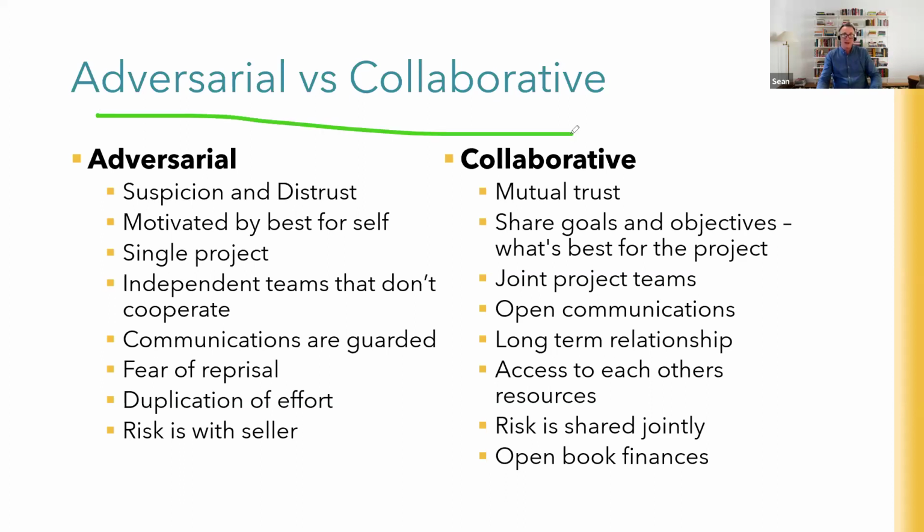So there are definitely advantages to going collaborative. But as I said, it's not just a simple shift, because organizational culture is the biggest challenge here. I've been on one alliance contract where they actually spent 3 months before signing it, getting the teams to work together just to see if they could work together, because that's the biggest challenge.